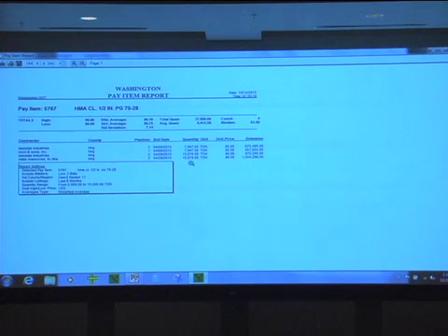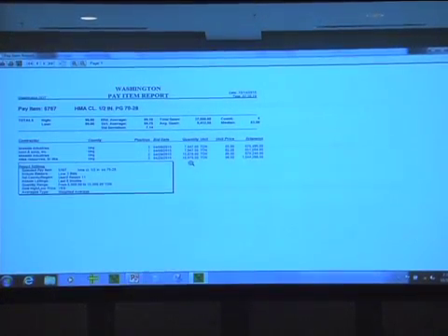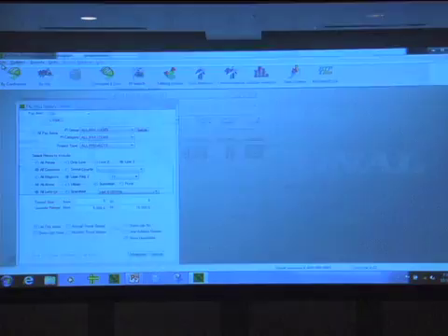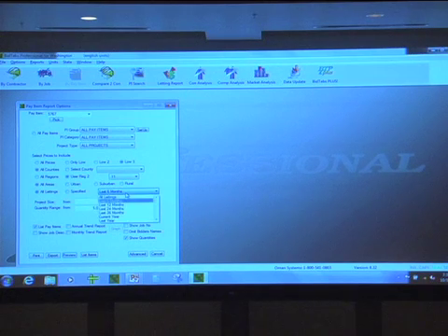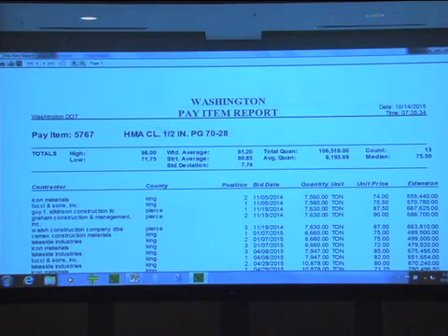Okay, I've got four jobs. Increase it to 12 months. Okay, you want 12 months? Okay. Yeah, it's a little small data set, so let's increase it out to 12 months, see if we get a few more jobs. Sometimes we could just be just outside when there was a lot of bidding, so. Okay, so you can see we got 13 jobs now. It's up to about $81 a ton.